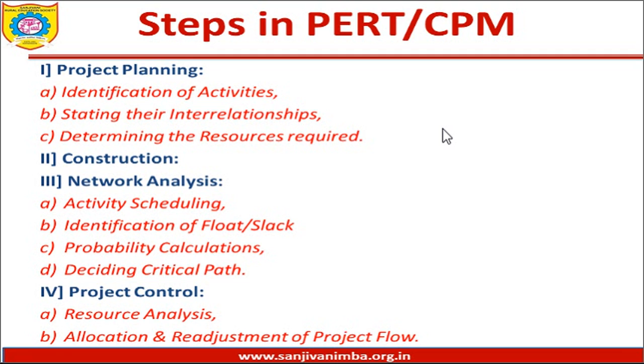With those dynamic changes happening in the economy, you need to ensure your project would meet its deadline, and for that you need to be very realistic. So you have to develop the probabilities associated with the network that you have drawn, to understand what the possible areas are where concentration needs to be given, or what the sensitive points are where you need to have some provisions or backups to make sure that your project would finish within deadlines.